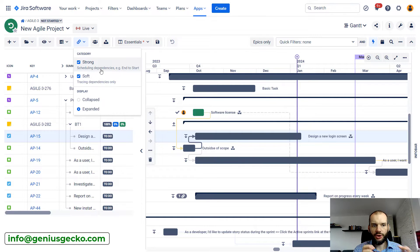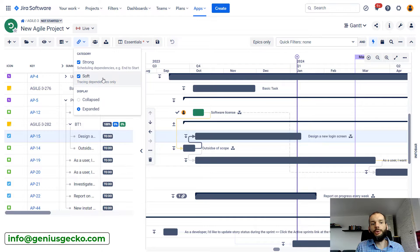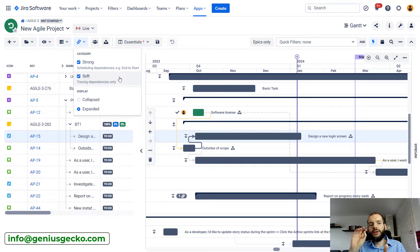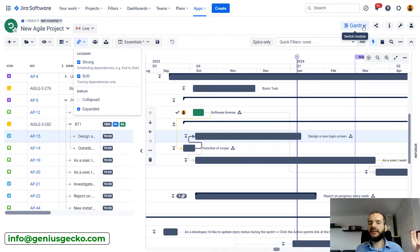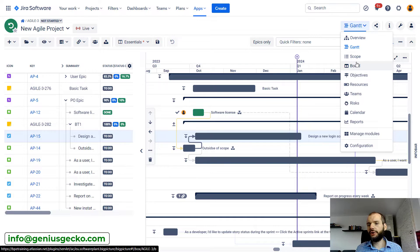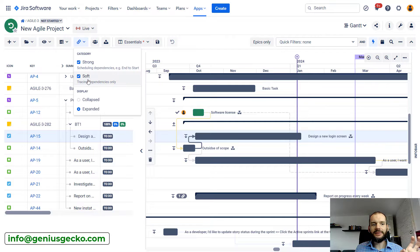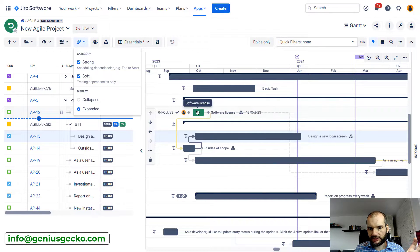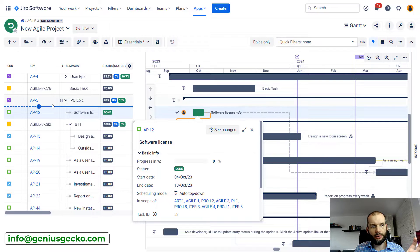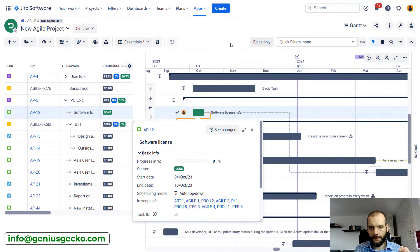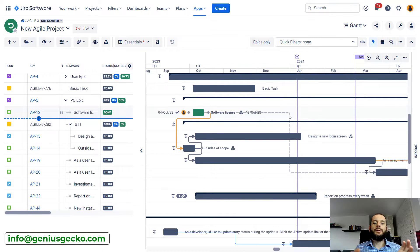The major difference between those two types is that a soft dependency will never cause other tasks to move. So if you have two tasks linked with a soft dependency and you move one task, it will never cause moving of the other task on the timeline. Soft dependencies are used mostly in agile planning in the board module. In the Gantt chart, soft dependencies are displayed as a dashed line — you can see one here between task AP12 and task AP20.